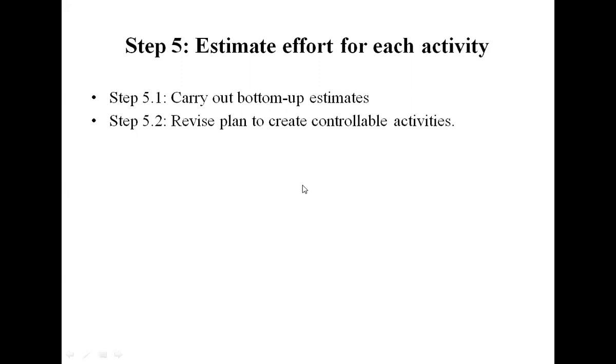So here, for example, long activities, say 12 weeks, make a project difficult to control. So we have to check after 6 weeks whether we are 50% complete or not. If not completed, it can be hard to tell. So it is better to break down into smaller subtasks, because we have to complete the project in only 12 weeks.